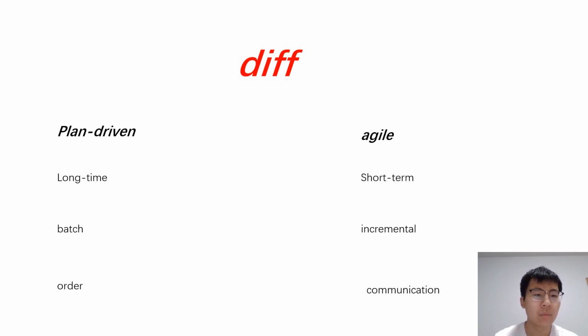For Agile, for example Scrum, instead of planning everything in advance and then sequentially moving through building and testing phases, Scrum breaks the process down into smaller, manageable pieces. Initially, we engage in just enough planning to begin development of a minimum feature set.